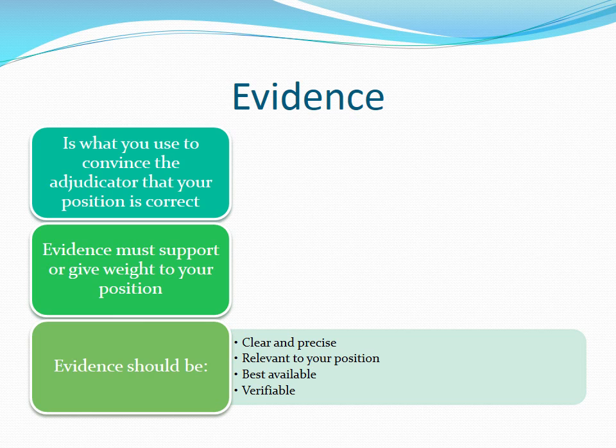Your evidence should also be the best available and verifiable. So if you have an oral recording of a meeting, you would submit that rather than make a transcript of the recording and submit that instead. If you wanted to submit a transcript because the oral recording has a lot of background noise and it is difficult to hear, you would also submit the oral recording so the adjudicator can compare the transcript with the actual recording if they want.